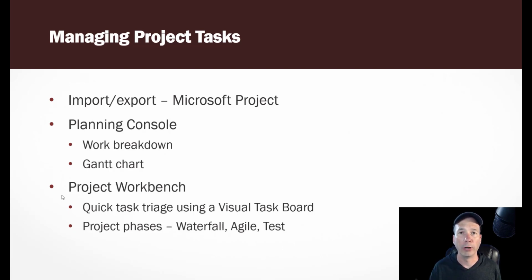You can work with your project, you can move tasks around, you can extend and shorten and make milestones and do all the same stuff that you're used to doing in Microsoft Project right in your web browser and in real time. Using something called the client-side planning console, I can do all that stuff, save it and batch it up to the server, or I can use a server-side planning console where all my changes go uniquely to the server and get saved.